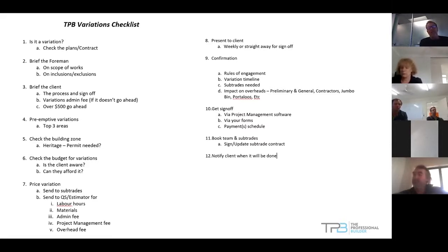But brief the client on the variation. You're making a sale. Having a variation process is part of your sales. We all know there's going to be a variation. Everyone who does a renovation or new build knows the most common thing people say: oh, it's going to blow the budget. How is that a fixed price? Is it going to keep the budget? The industry is known for blowing the budget. So by having the variation process in your sales pitch, you tell them we can't blow your budget because it's a fixed price. But you talk about the variation process: nothing can get done without you signing it off. Your budget's your budget unless it's signed off. If your architectural plans change from what's on site, that's a variation, nothing to do with you. If they want to wallpaper the living room instead of just painting it, there might be a variation, nothing to do with you. Once again, it's their choice. Having that process is really key. Preempting variations is a big part of the sales pack.